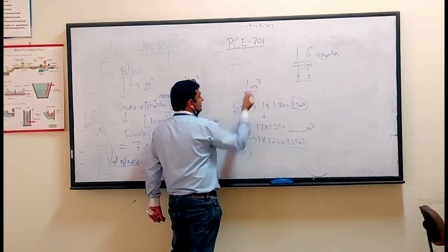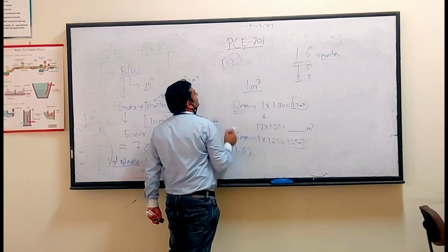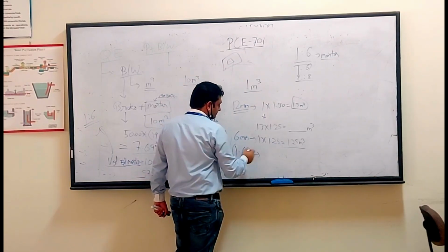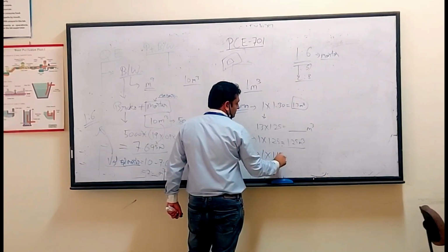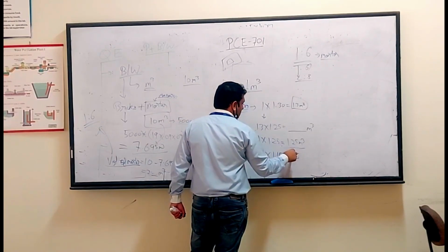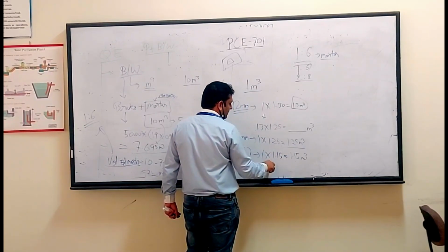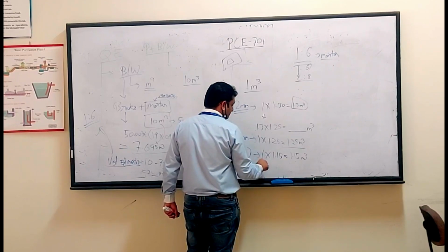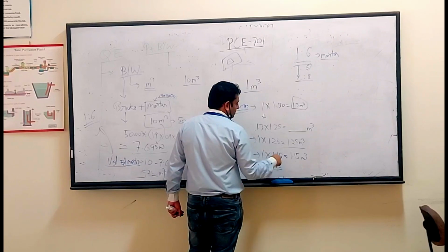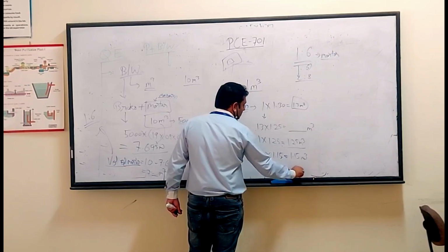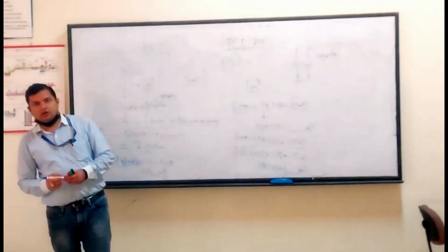Restart. For the masonry mortar, in brickwork, there is one component known as the frog. Considering this, we will increase the volume by 15%, that is, multiply by 1.15. And 25% is for what? For wet to dry. Whatever quantity you get in cubic meters will be the net quantity of the plastering mortar.